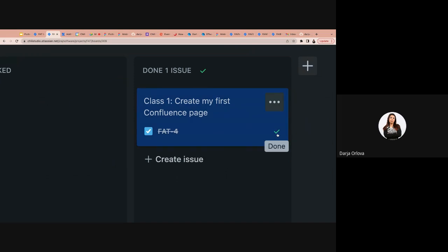But in general, this is how we do it in Chile too. Because we are an agency, which means we work for clients, and we need to build clients, and clients need to understand what they're built for. We log time to the tasks that we work on. So for example, today I spent 4 hours on implementing a login or something like that. So I log 4 hours to the login ticket. And then by the end of the month, it all gets put together into a form and sent to the clients. That's why time tracking is important.